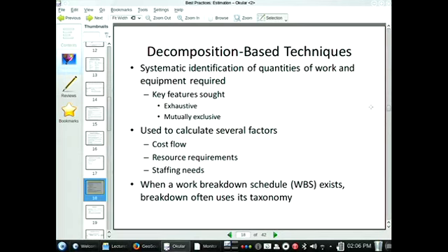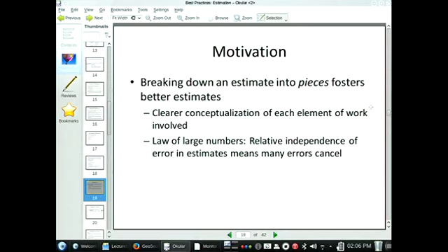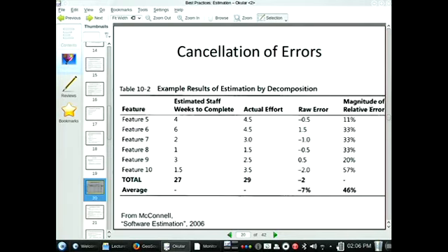Here we are typically taking apart this overall project into pieces. We have a much greater sense of what's required once we enumerate the different features. So you break this overall deliverable down into features, and then you give some estimate for each in terms of staff weeks, sometimes called person weeks. It could be one person over 4 weeks or 4 people over 1 week.